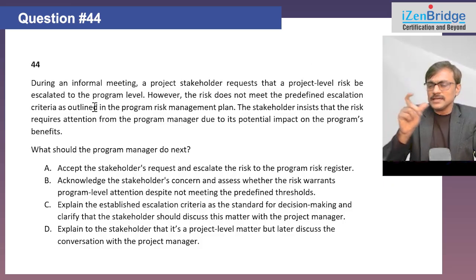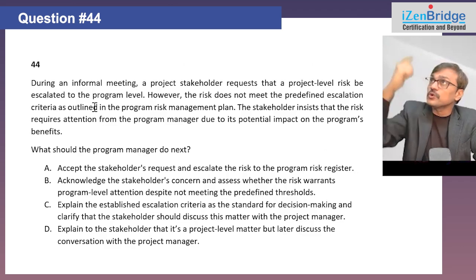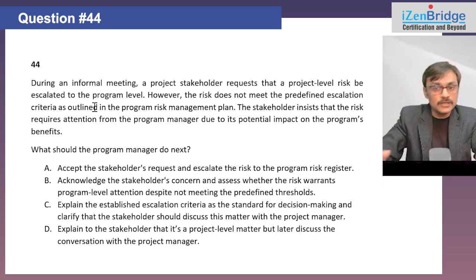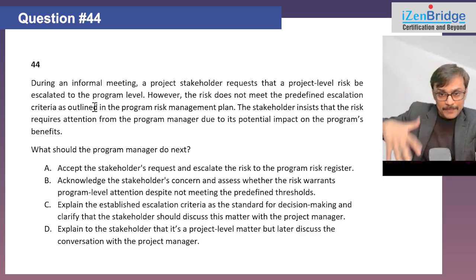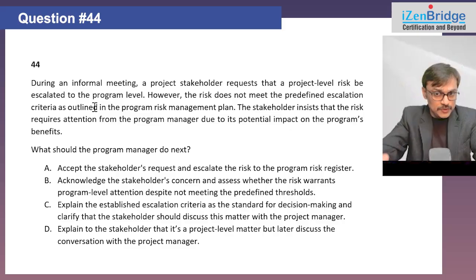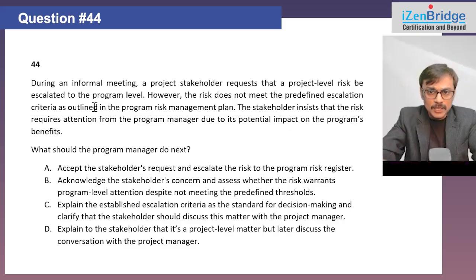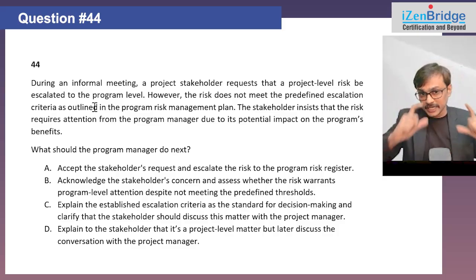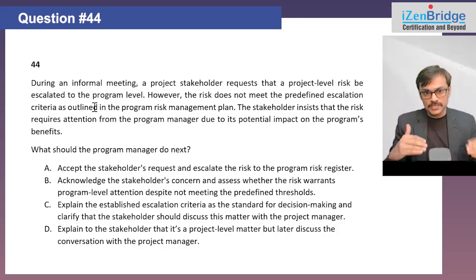I think it cannot be handled at a project level. It should go at a program level. Yeah. Someone is thinking now, why do they think about it? Maybe they believe it has an impact beyond a project, or they believe it has an impact directly on the benefits which we are expecting from the program, not just limited to deliverables and outcomes which are coming from the project. So that input you are getting, but at the same time, the question is showing that it is not meeting the threshold criteria which you have defined as per the program management plan.